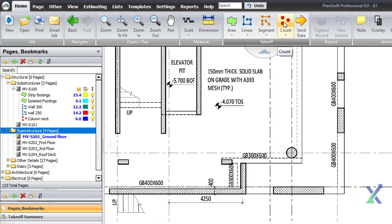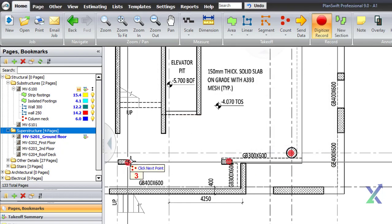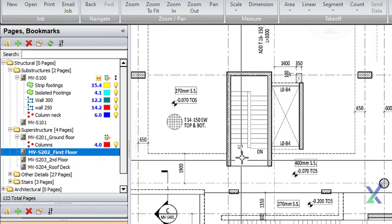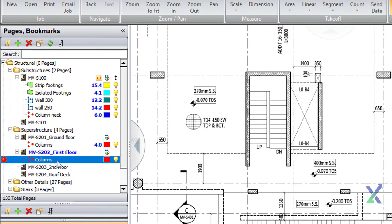Lastly, we'll use the Count tool to tally our columns. Simply select the columns on our drawings. We can use the same count description we created for the ground floor for the other floors as well.